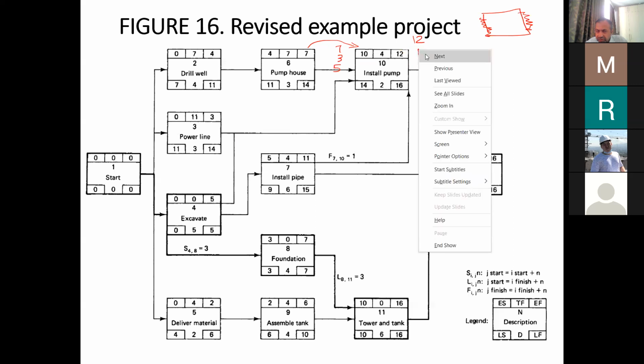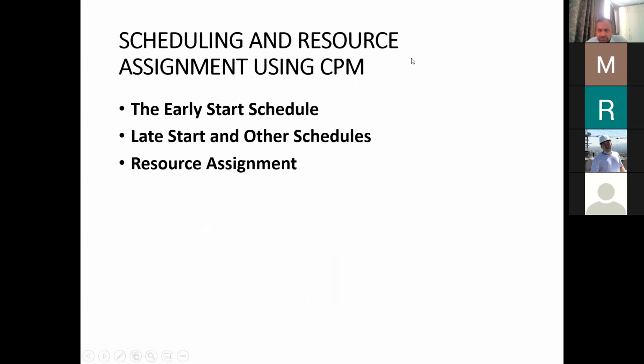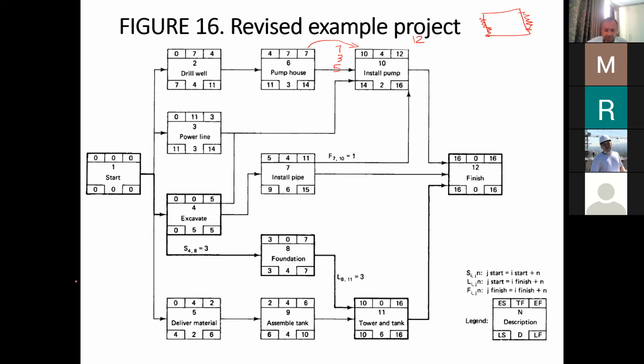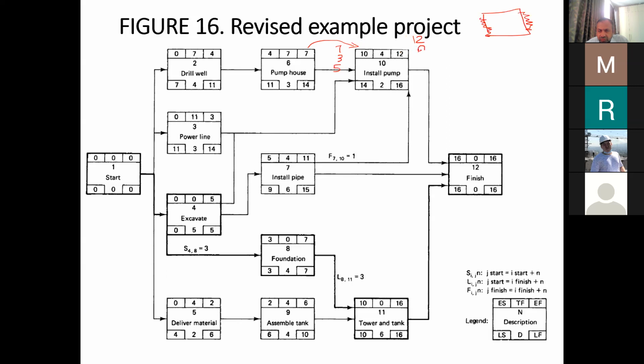from here, now we will get what? So one value will be 12, another value will be 9. We have to take the higher value, because otherwise it will finish at 9, which is not possible. So the highest of the 3 values will be taken. From here we will take 12, and then 12 minus 2, then we will take 10. So we need to consider it.